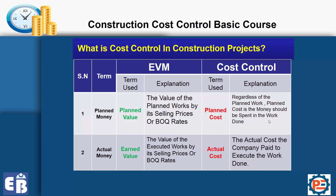On the other hand, cost control uses the term planned cost. Regardless of the planned work, the planned cost is the money that should be spent on the work done. For example, let's say you executed 100 cubic meters of reinforced concrete. The planned value would be the value of that 100 cubic meters according to your contract or BOQ prices, whereas the planned cost is the planned money you should spend according to your cost baseline to execute those 100 cubic meters.